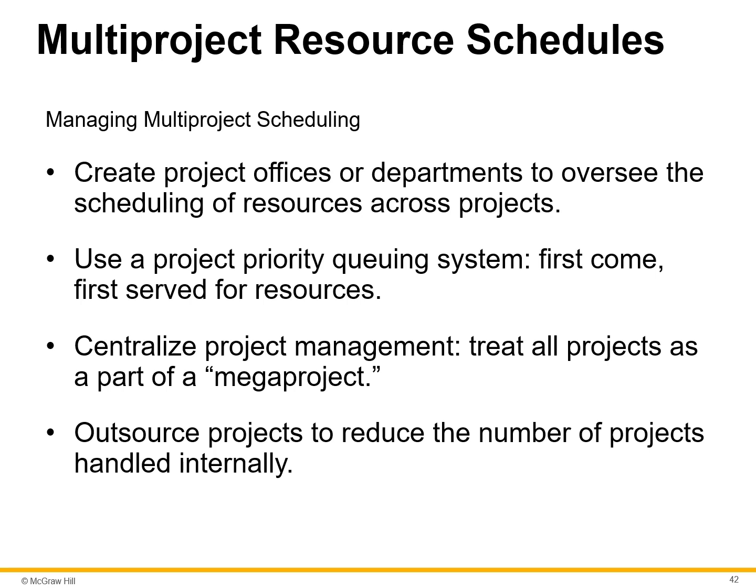Finally, many companies are using outsourcing as a means for dealing with the resource allocation constraints. In some cases, a company will reduce the number of projects they have to manage internally, only cope with projects and outsource non-critical projects to contractors and consulting firms. Companies may hire temporary workers to expedite certain activities that are falling behind schedule or contract project work during peak periods when there are insufficient internal resources to meet the demand of all the projects.